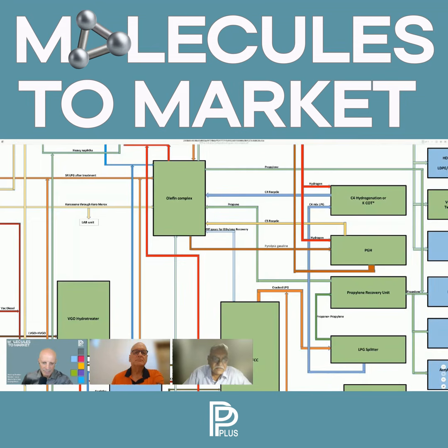So for the team project, what I will do is I will also assemble all these technologies at one place. The one direct inference is that for the refinery side, we can basket the technologies to a large extent, but on the petrochemical side, it is very difficult. So we will have to do technology selection unit wise, and then somebody will have to integrate it. So when we do the basic engineering or the front end part of licensor selection, one important part is that the consultant has to be in position while we are doing this.